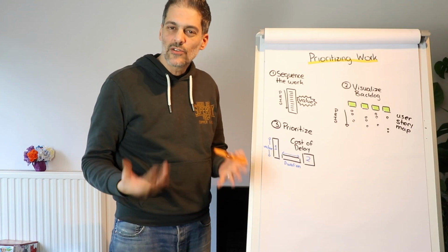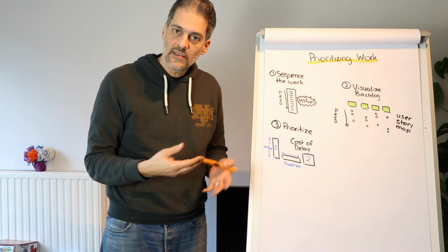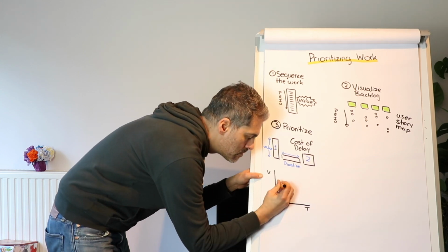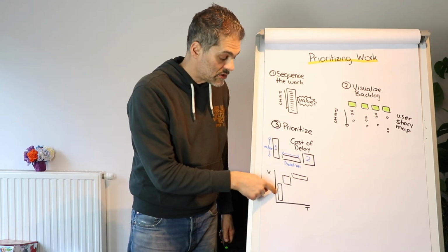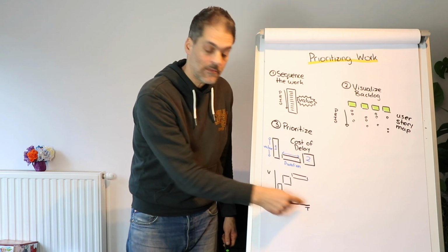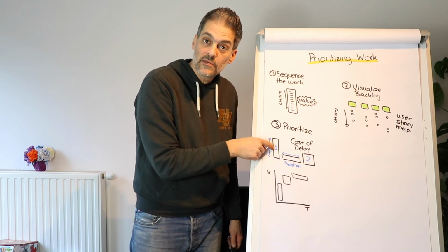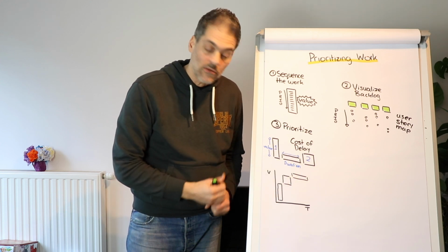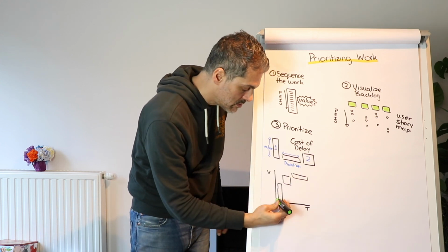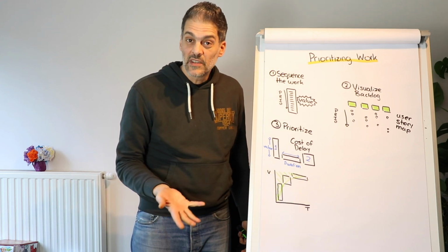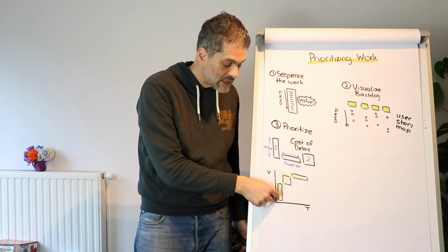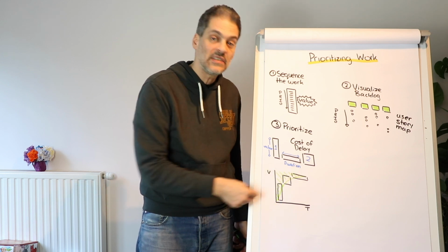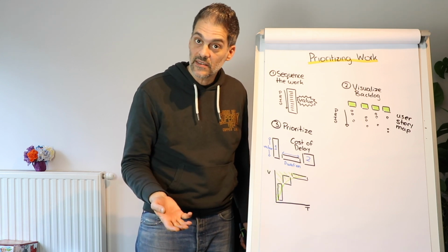Okay. So how does this look if you prioritize using cost of delay? Something like this. So what you see here is, on this axis we have time, and first I would implement the most valuable projects, then the square, and then the long rectangle, right? And this curve here is my cost of delay. It's how much money we lost because it took us time to put these things in the market or put those ideas in place, right?